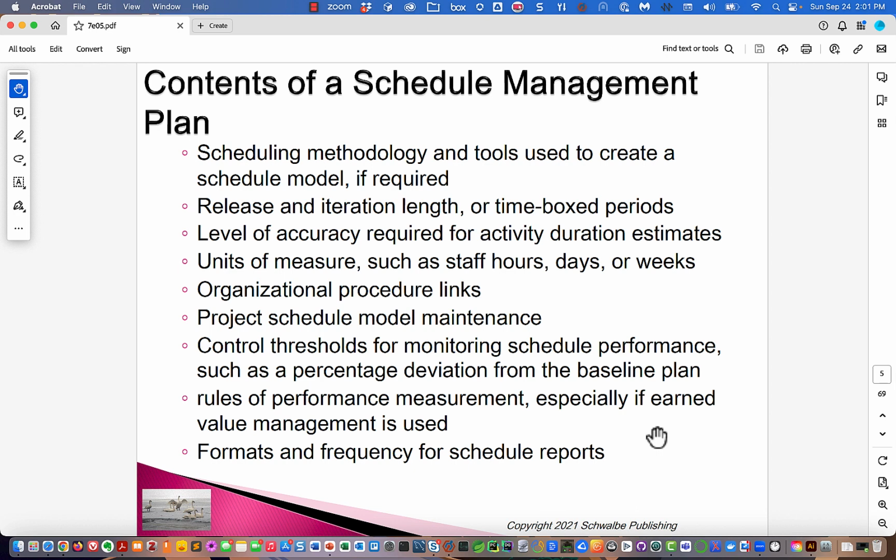So if we originally thought that the whole project would cost us $1 million, and we've added up all the things we completed so far, and we originally thought that the sum of what they would cost us would be $250,000, well, we'd say that we have $250,000 of earned value. Okay. Well, we easily could have already spent $500,000. Okay. Things might be taking us very much longer than we thought.